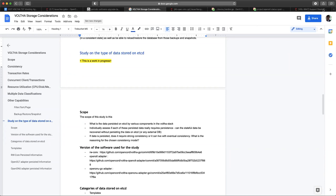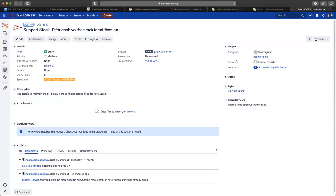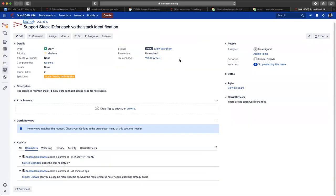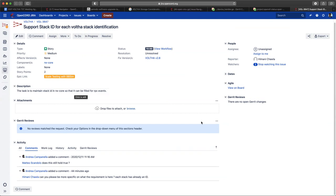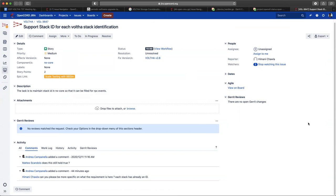I just got an update from Imani about the stack ID. She said 2.8 and two story points. To maintain stack ID in RW Core so that it can be filled for RPC events. That should be fairly straightforward, but again, not in 2.7. Teo, does that clarify the requirement? Yes. Perfect. So it's basically just to pass a parameter. Yep. Sounds good.